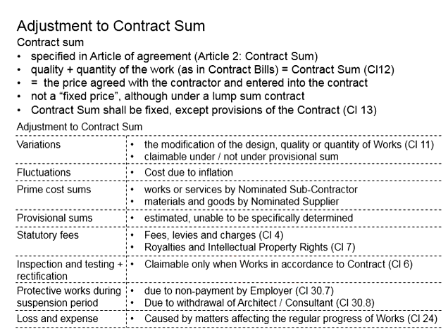Therefore, for whichever work has already been done, the contractor may suspend the work, leave it there, but properly protected until the employer pays the contractor the relevant amount for the work that has already been completed. The protective work incurs costs, and this cost shall be charged to the employer. Therefore, adjustment to the contract sum is allowed.